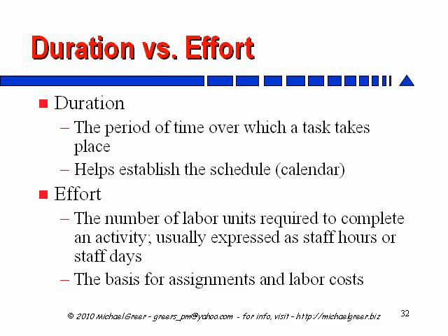In the meantime, we have 5 days of duration for the project because after they pour the cement at the end of day 2, there are 3 days in which the cement simply lays there and dries, and no one is needed, no more labor, no more effort is expended. So that's the difference between duration and effort.